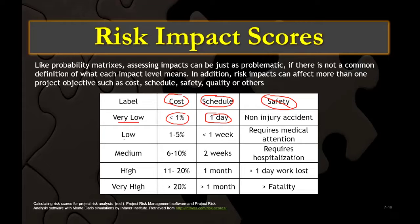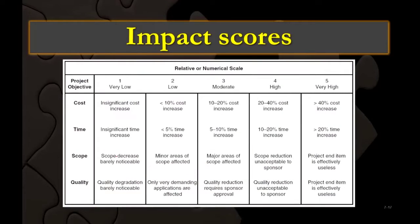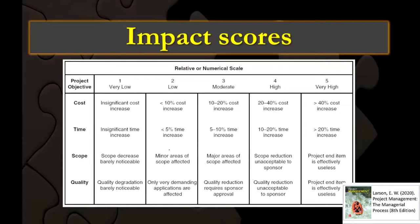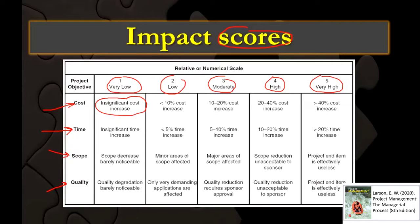For impact, we always create levels and give numerical scales: 1, 2, 3, 4, 5. There are numeric scales, and you can find that table in the book — this table is also in the PMBOK. We create a score for the impact: 1 for very low impact, 2 for low impact, 3 for moderate impact, 4 for high impact, and 5 for very high impact. We have four dimensions: cost, time, scope, and quality. For cost, we talk about cost increase. If it's insignificant or less than 1%, the impact is very low. Cost increases of 10–20%, 20–40%, and more than 40% move up the scale from low, moderate, to high, to very high.